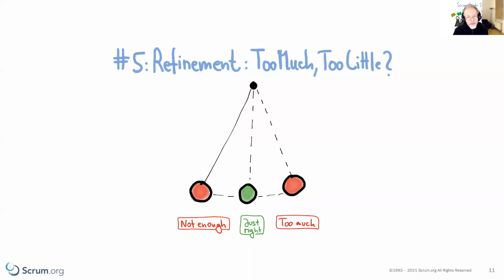How long is the change history? If you have a ticket that's been put in there once, never discussed, you will see a very brief change history because it was created once and then nothing ever happened. Another ticket that might have gone through the process typically will have a change history that shows that, over the course of 3 weeks, the ticket has been changed 4 times or something like that. Someone added text, someone deleted text. There probably are comments on the ticket. All these are indications for how the team is working.